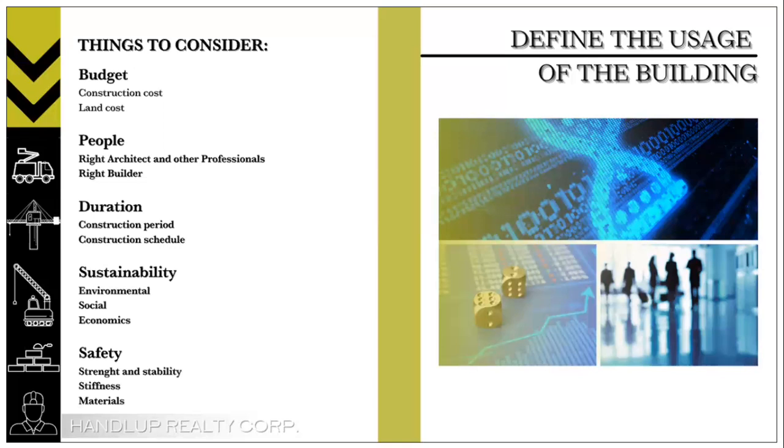Third is duration. Faster construction schedules can help building owners earn money on their investment faster by moving clients in sooner. It also leads to lower financing costs because shorter construction time means reduced interest charges. Time-related savings can easily amount to between 3 and 5% of the overall project value. Though speeding up a project maximizes value, we must always remember that speed is achieved without jeopardizing safety.